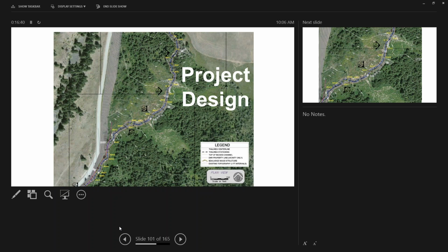And then we were very fortunate to inherit this site with the data set that Joe Lang had done when the NRCS was looking at being involved. And so we entered this project with a full topographic survey having already been done, which was amazing and very helpful. And we've built on that. We've done topographic surveys annually or as often as possible since then to track the changes in the stream, cross sections as well as longitudinal profiles. So it was really great starting off with that information in hand. That normally wouldn't happen, but we've tried to make the most of it.